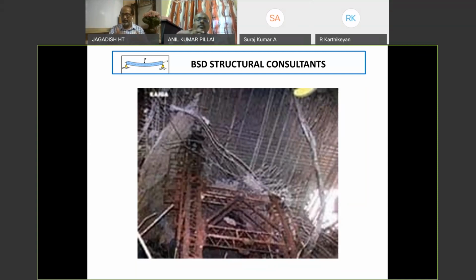So it's one of the safety features which we employed here, that during construction, to segregate people working below from those working on top, so that even a nut or bolt falling shouldn't fall on people below, we have put a platform. So that saved a lot.